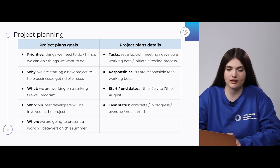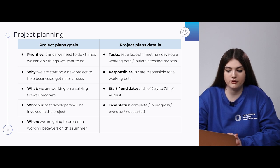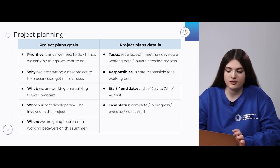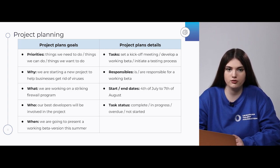We should fill the gaps with tasks, responsibles, start and end dates, and finally put a status for each task. For example, tasks can include: set a kick-off meeting, developing a working beta, or initiate a testing process. For responsibles: a name is or are responsible for a working beta. Start and end date: from 4th of July to 7th of August. The status of a task can be completed, in progress, overdue, or not started.